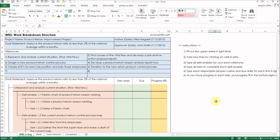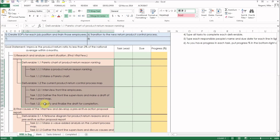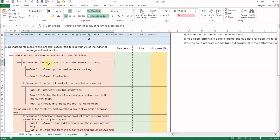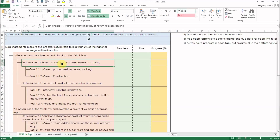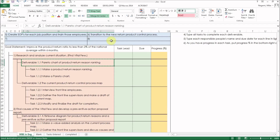This is a completed WBS from a previous video. Here is a section of deliverables and tasks. We are going to copy and paste WBS deliverables and tasks to the Gantt chart. Since my WBS uses merged cells, you can't copy and paste merged cells directly — if you do, this will happen. Therefore, copy only the text in your formula bar and paste it onto the Gantt chart.